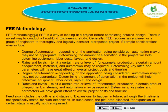FEED is used to establish a price for the execution phase and evaluate potential risks. FEED deliverables typically include: project organization chart, project scope, civil mechanical and chemical engineering definitions, hazard safety and ergonomic study, 2D and 3D preliminary model, equipment layout and installation plan, engineering design package development, major equipment list, automation strategy, process flow diagram, project timeline, fixed database, and weight report. All of these documents would be developed in detail during the design review.